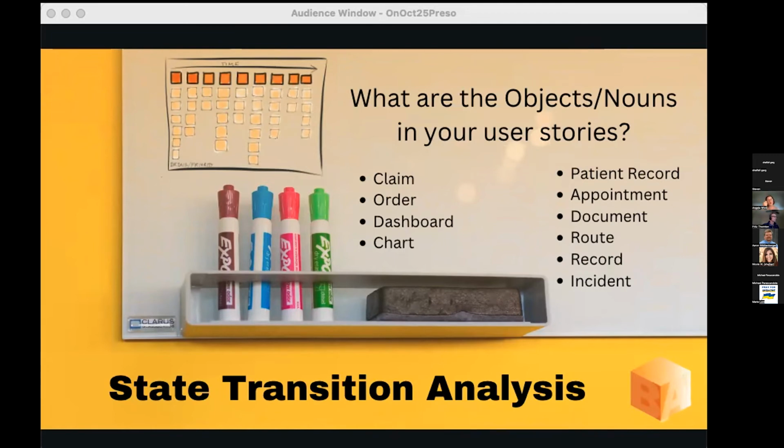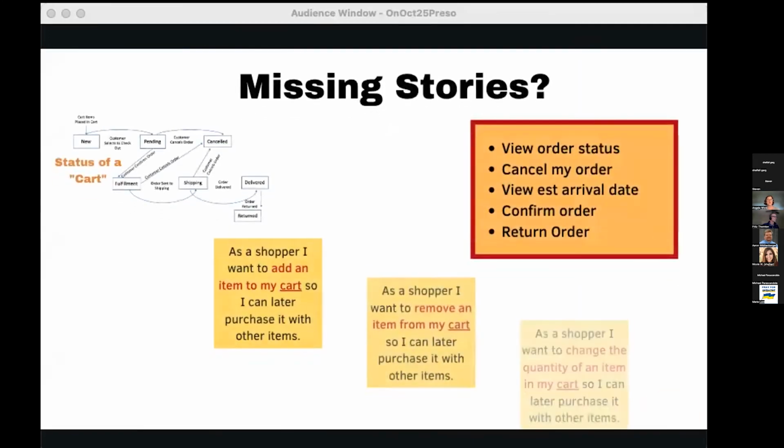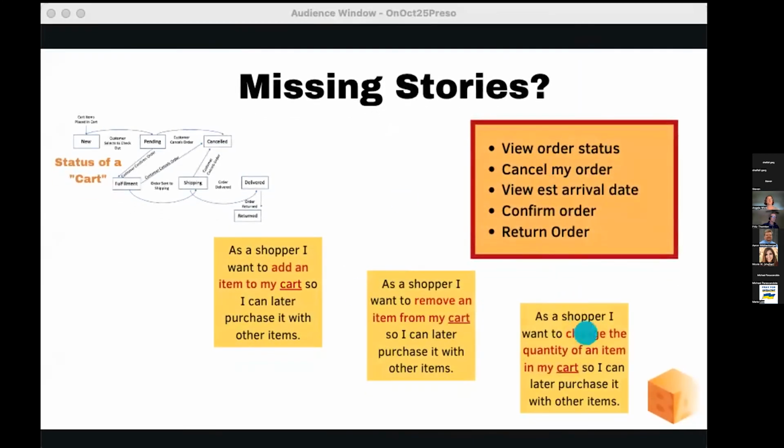So it's not for one card, because as you see, that one state transition diagram brings on 7 or 8 user stories. And then you might split those user stories into smaller stories. So yeah, definitely these visual models become kind of a contextual picture of multiple user stories, which helps us connect the dots more and helps with testing and all that. Aaron, no surprise you've used them before, right?